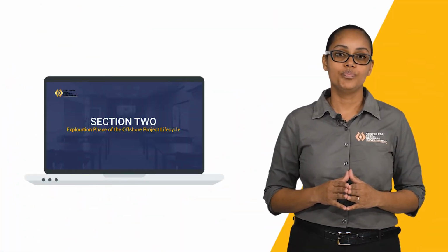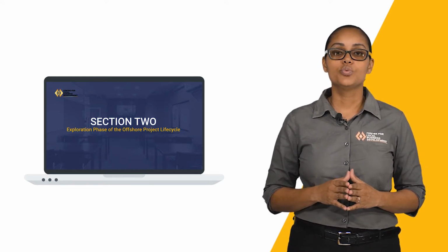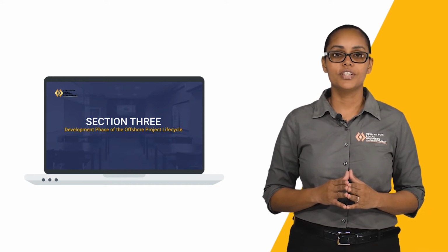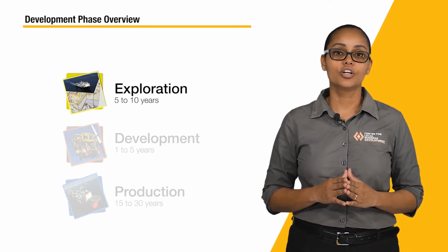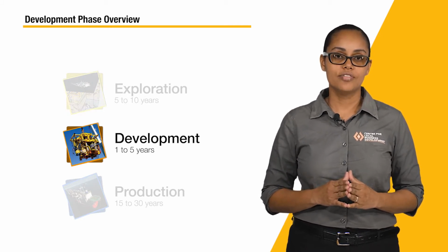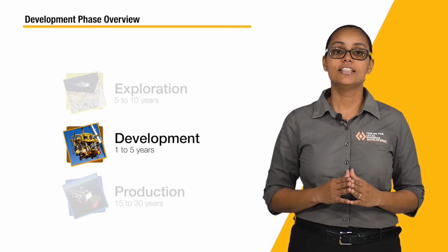In our last session, I took you through Section 2, where you were introduced to the offshore project lifecycle, starting with the exploration phase. In this section, we will review the next stage in the offshore project lifecycle, known as the development phase. If commercially viable reservoirs of oil are confirmed during exploration, the project moves into development, which lasts from 1 to 5 years. Guyana's offshore industry currently sits in the development phase.